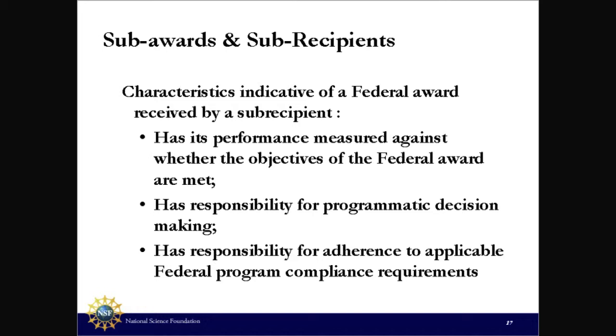And they have to be aware that all the policies and procedures and the federal requirements that you as the prime awardee are responsible for, guess what? They are just as much responsible. So it's a flow down situation. All the rules and regulations that you have to follow, they have to follow and comply with as well.